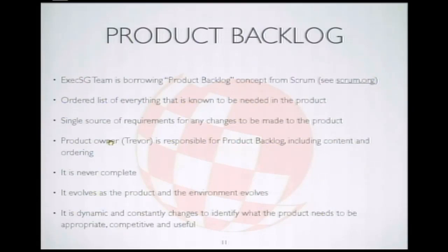Another important item is that this is a single source of all the stuff we're going to do. So if it's not on there, it's never going to be done. So if somebody posted on some web forum, oh, I want this feature, and some guy said, oh yeah, we're going to do that on ExecSG. Well, if it's not on the backlog, it's never going to be done. Now, ideally, I'd like to make the backlog public, right? But Trevor and I will discuss that.